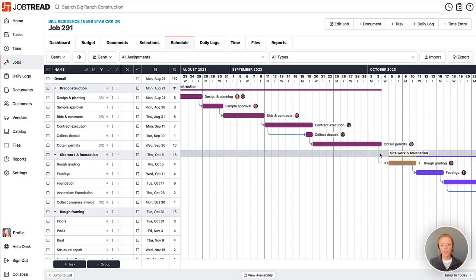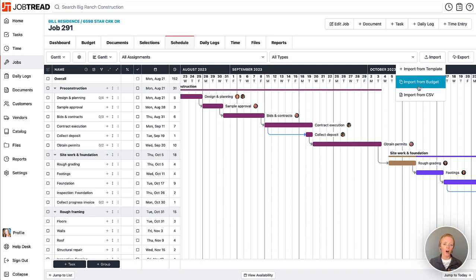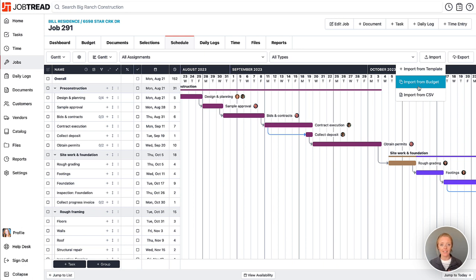Now you also have the ability to import from your budget. If you'd like to import tasks from your budget on this job, all of your cost groups will become task groups, and all of your cost items from your budget will become tasks within your schedule.